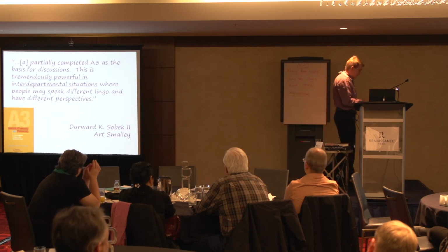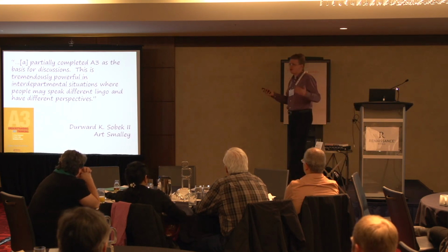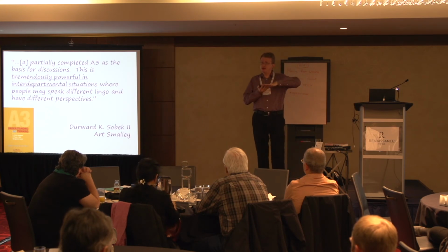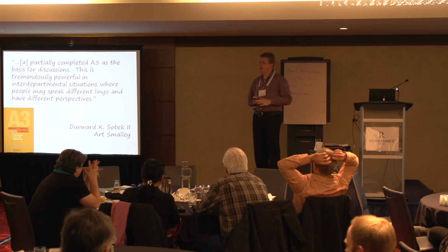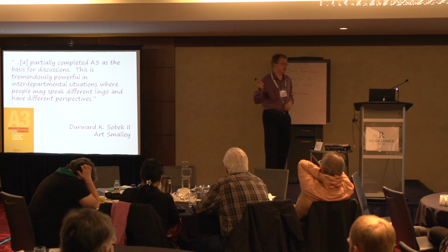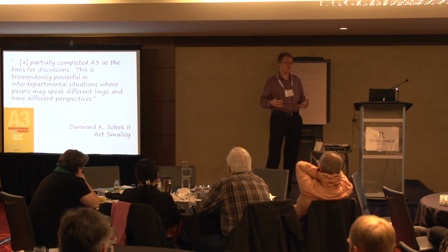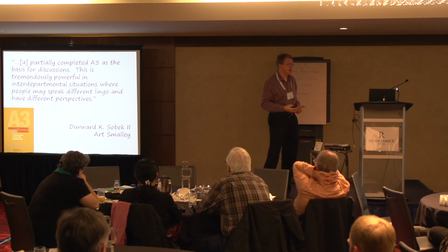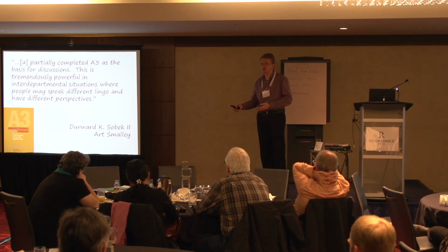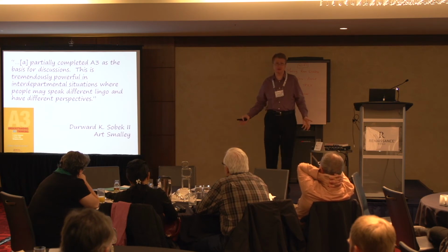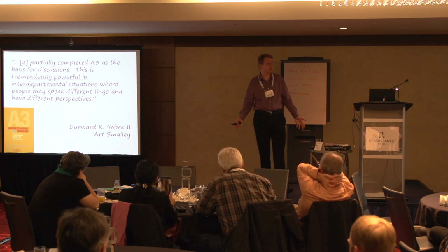Well, this is from one of the foremost experts on A3. A partially completed A3 sheet, which means, well, it's completed partially. And let's say our current agreement is that we kind of agree on what's on it already. We add one section to it from expert analysis, and we run an experiment. The hypothesis being, will the understanding of other people catch up to it? And if not, then what can you do? Roll it back. You can't proceed any further, because that becomes a worthless piece of paper. Because people will not follow what you write on that piece of paper.